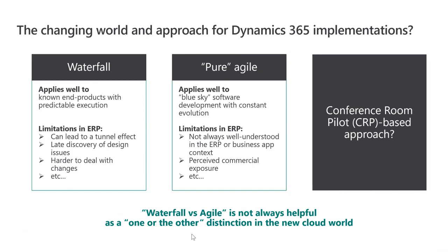Typically on a waterfall methodology, you'll see things where, for example, there is too much reliance on design on paper instead of early validation in the system. Customers typically don't have the experience or the expertise to sensibly review very detailed technical design documents. And if that's part of the methodology, they feel they have to approve it, but they're not quite sure what they're approving. There's a little bit of hesitancy in the meaning of those approvals.